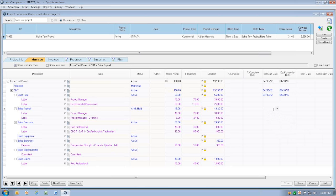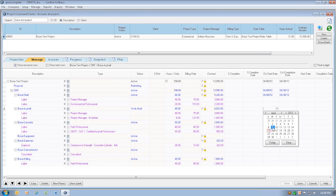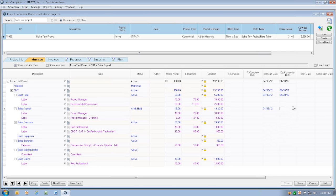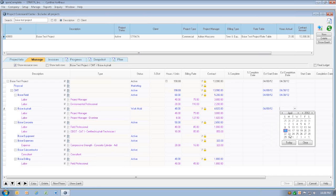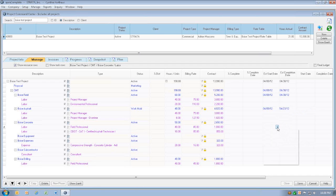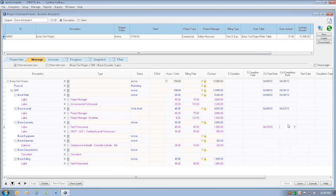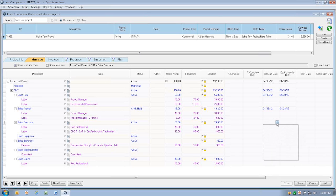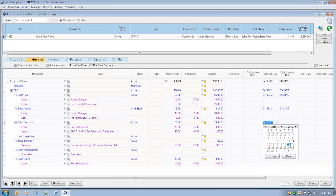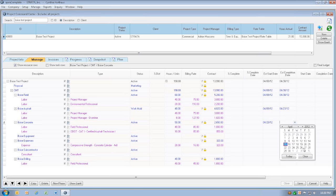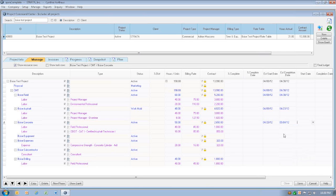We'll do the same thing for the Boise Asphalt phase. Let's say this one was only going to last about two weeks. Concrete, it's not going to start until this Friday. I accidentally entered it on the resource line. It's not going to start until this Friday, and it's going to go until the 4th of May.